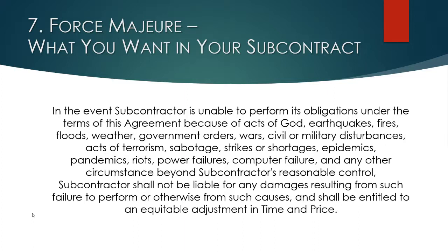And then you take it one step further, and you will become entitled to an adjustment. You'll be entitled to time and money that you suffer because of these events. Now, that may be a stretch when it comes to negotiating with the GC, but something to try if you think you can.